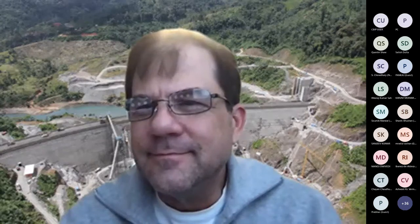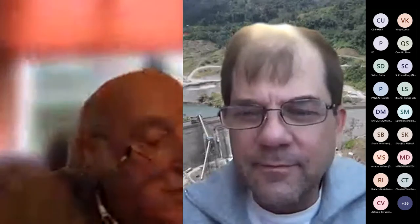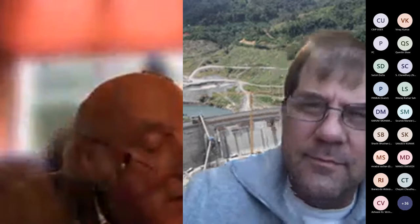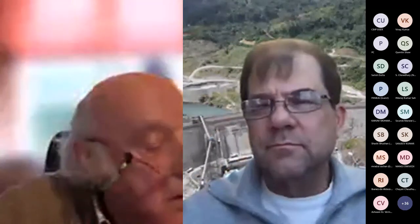I really wanted to make a point about the value of time. Chris included a very important slide within his presentation regarding the Gatgar project. Because RCC was used, there was a 3-year saving in time, and that saving in time was equal to half the cost of the project, not the dam, the total project.